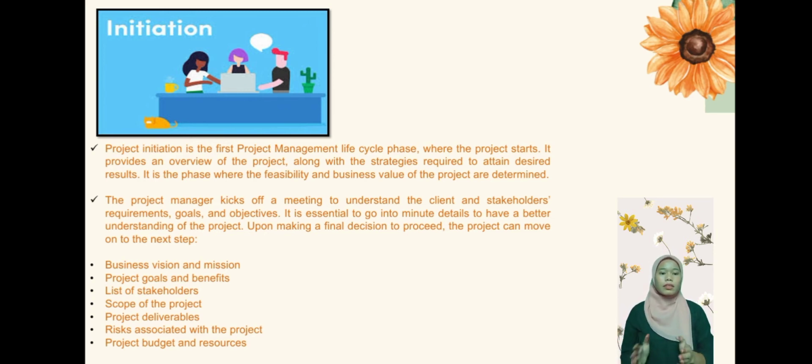Okay, the steps are the business vision and mission, project goals and benefits, list of stakeholders, scope of the project, deliverables, risks associated with the project, and last is project budget and resources.